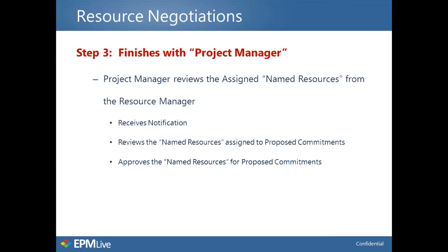Step 3, once Christina saves her changes and or additions, I'll receive an email as the project manager, and then I'll go in and I'll review that notification or email and the named resources that she's entered. And then I'll approve those named resources, and that will become a full commitment.